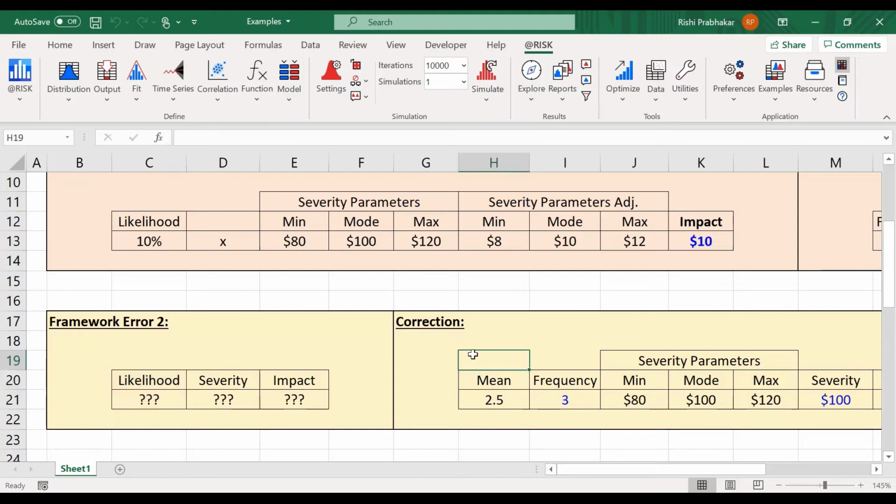In the little blurb that I put together about what I would be talking about, it was about making a model not just that is technically correct, because a lot of people don't care about that, but let's make it helpful to the user. Let's make sure that we're doing things easier. So once we establish this frequency component of our model, this distribution, whether it's the Bernoulli, the Poisson, or something else, it actually determines how many times something happens. So what's left over for the severity or the consequence are parameters for something happening.